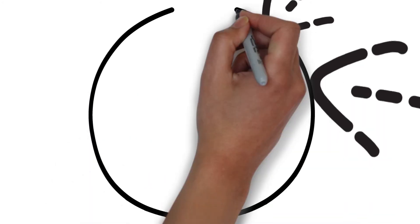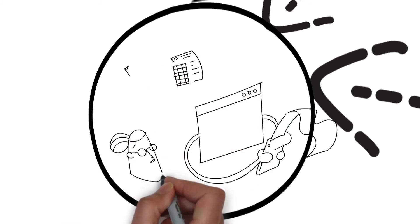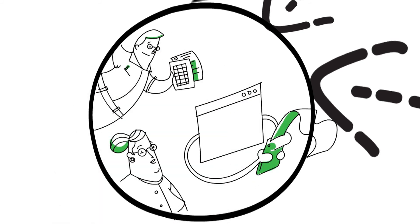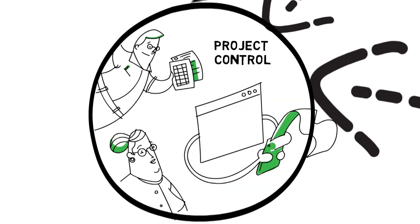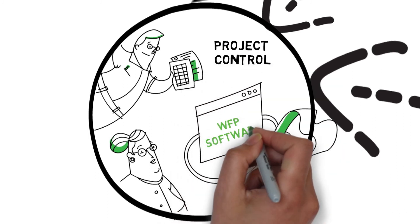One of the key functions of the workface planning software is its ability to calculate planned value for each model component. In order to achieve this, the information manager coordinates with the project controls team to develop a matrix of installation rates and rules of progress that are then loaded into the software.